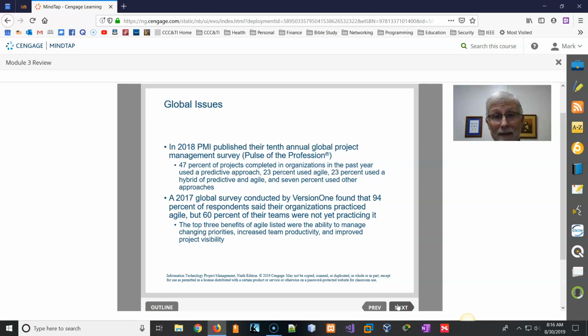In 2018, the Project Management Institute's Pulse of the Profession survey found that 47% of the projects completed in an organization in the past year used a predictive approach, 23% used Agile, 23% used a hybrid approach, and 7% used other. So as you can tell, 47 plus 7, I've got 53% of the people out there using something other than a predictive approach. And a predictive approach, we'll go into a whole lot of detail, is just saying I've got locked milestones going in, and I've got to make sure things are done.